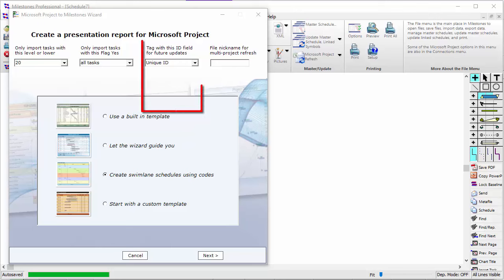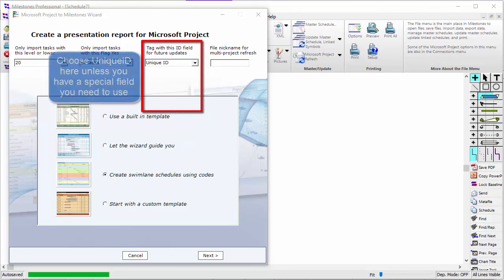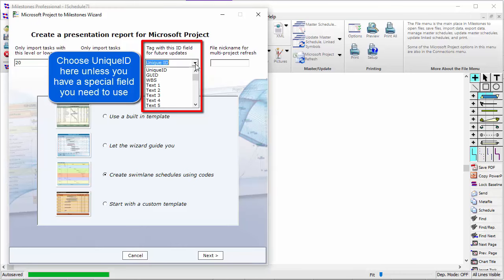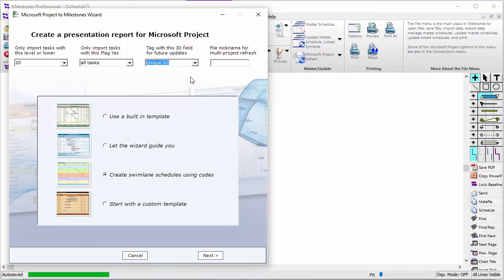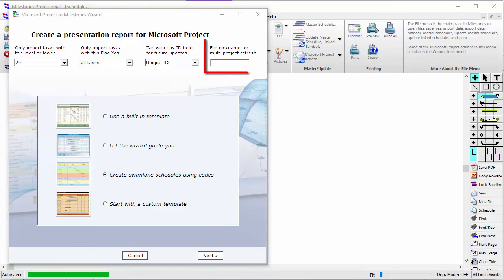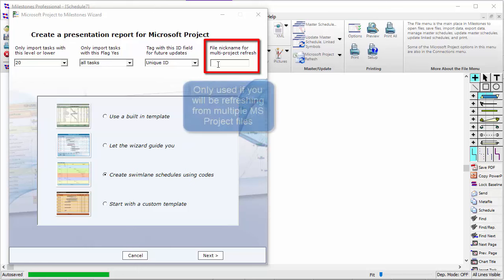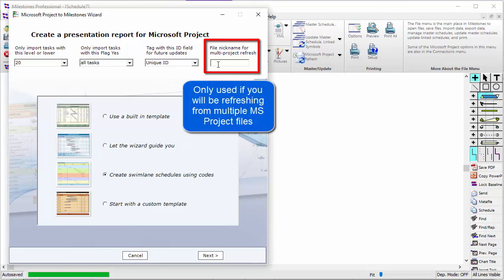The third drop-down box is for picking which field to use to link your Milestones task to Project. By default, Unique ID is set. Only change this if you have another valid unique identifying field in your project file, as you'll need to use this field to refresh your tasks later. The final box is the nickname field, which you only need if you are going to link multiple MS Project files to the same Milestones file.